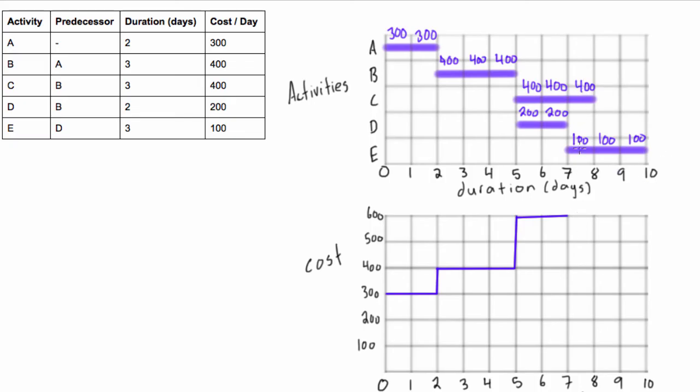But let's look at this. We have $400 plus $100, so on day eight we have a total of $500 being spent that day. So we'll come down just like that.